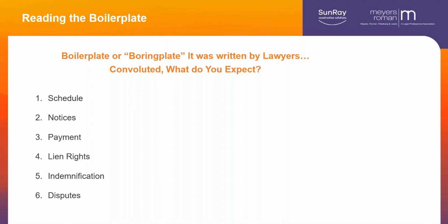If they don't have a clause on who's going to pay for the legal fees under the disputes clause, it may be stuck right in there in the indemnification clause that says in the event that there's any claim made, you have the obligation to defend it.